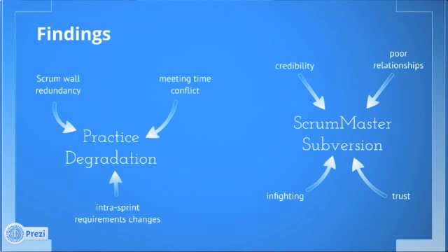And so what happened then was a lot of the sprints went over. A lot of the sprints turned out to be 40 days instead of 30 days. And this made upper management perceive the whole Scrum thing as not working very well, and it made them perceive the Scrum Master as not having a good hold on the process, and not able to deliver on time. And they felt the development team wasn't very good. So, basically, they lost confidence in the Scrum Master.